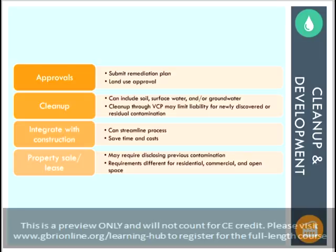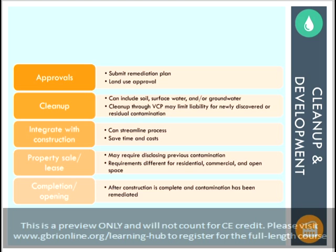As with any project, it is a good idea to market leases for the finished building from the start, or to have a prospective buyer in mind if the owner will not be the building occupant. Most types of contamination and remediation measures will need to be disclosed to prospective tenants or buyers. There are also different regulations in place for various use types. For instance, a residential zone will need to be more contaminant-free than an area that is simply set aside as open space. The project is considered complete once the construction is finished and the property is occupied.